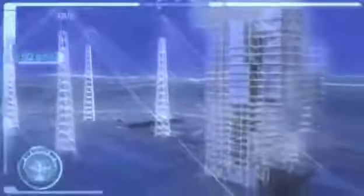But despite moving the tower to the edge of the runway, 2 of the lightning towers and their guy wires are within range of the tower when it's demolished. The team are worried that flying debris could snap a guy wire, releasing nearly 3 tons of tension and toppling the lightning towers.